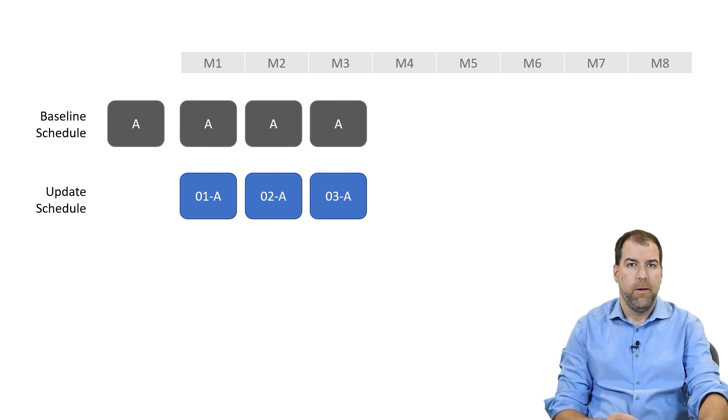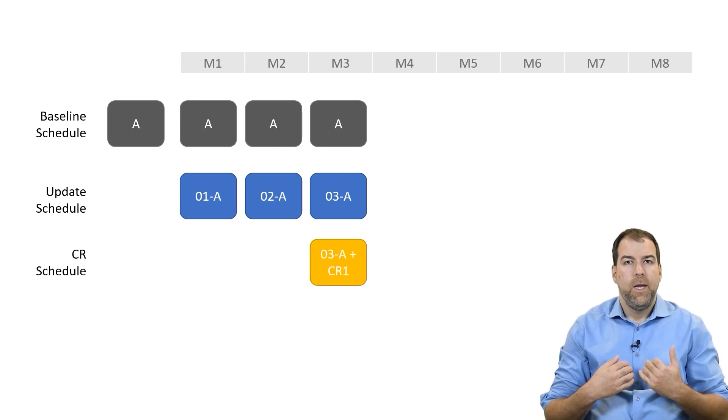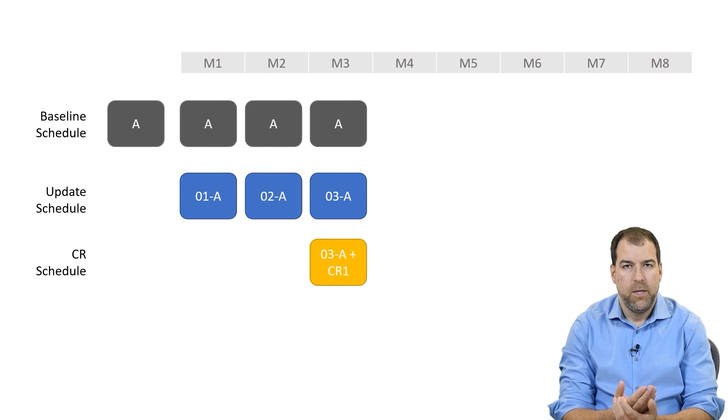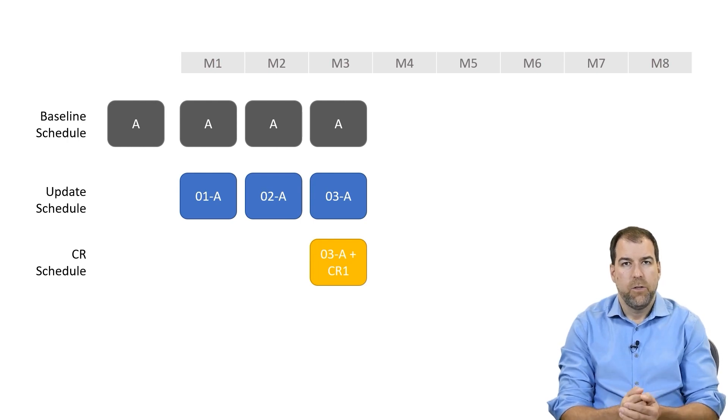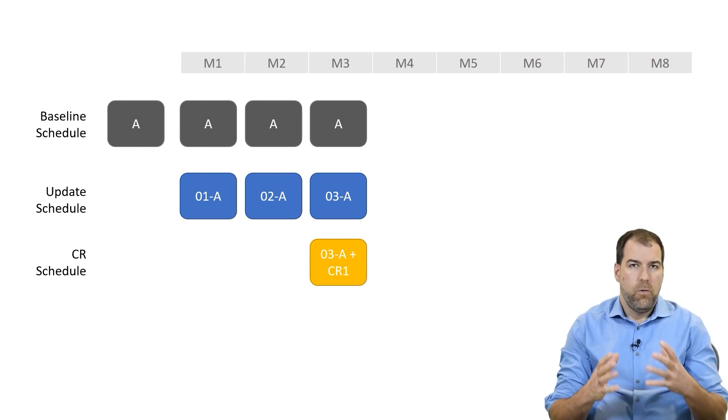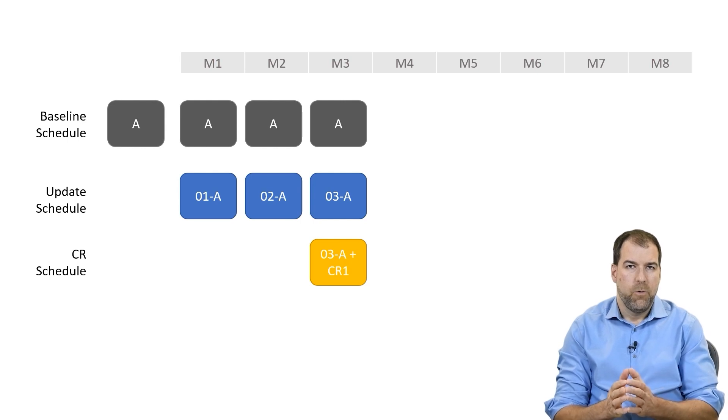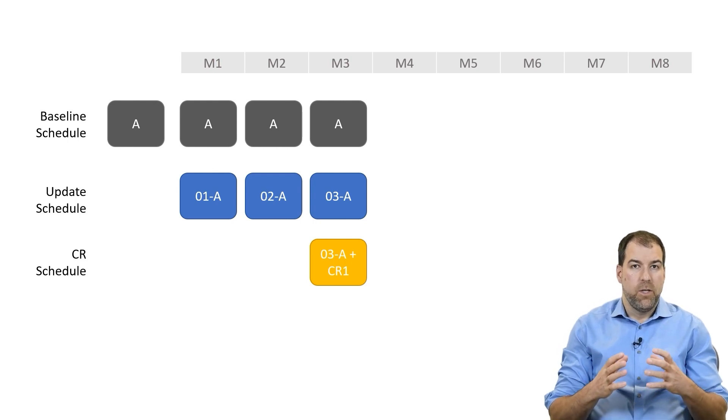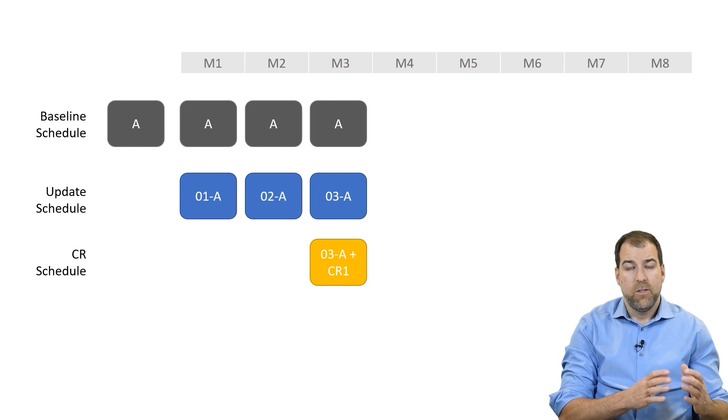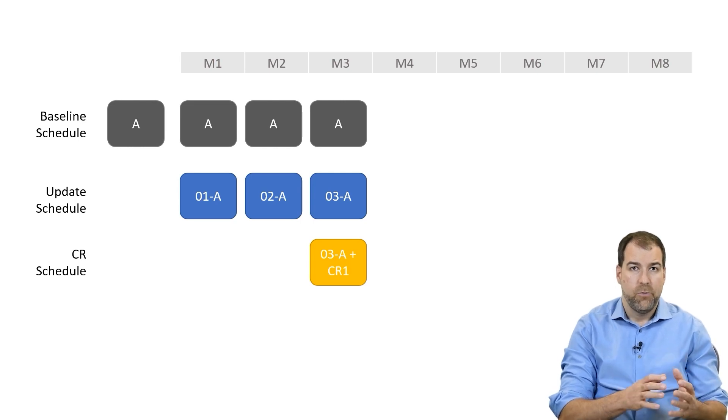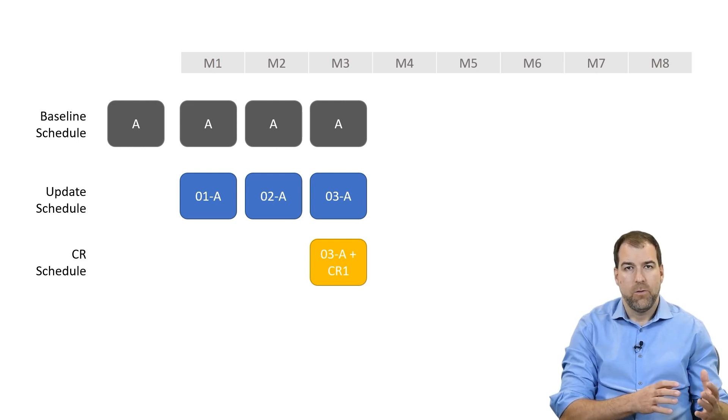In month three, we as the contractor are issuing a change request to the owner. We have a change request. So in order to create that change request, we as schedulers need to go and add some activities or build that change request in the latest update schedule.